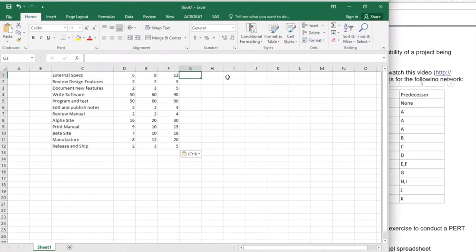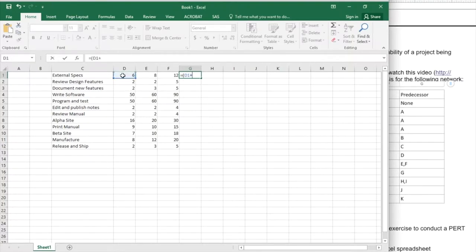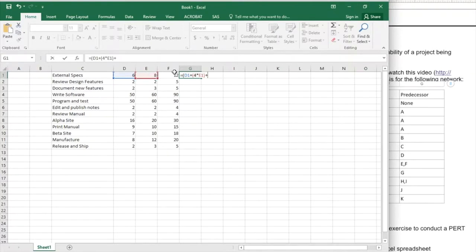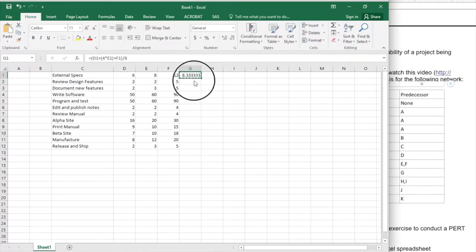I'm going to enter my formula here for the TE time value, which is the optimistic plus 4 times the most likely plus the pessimistic divided by 6, and I'm going to calculate that for all the given tasks.